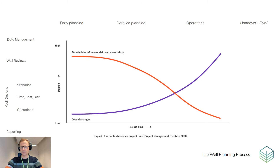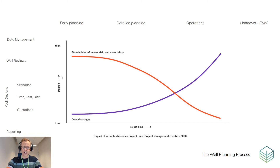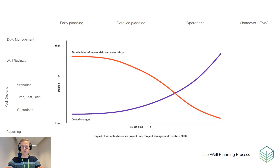Maybe equipment has been ordered, a study has been kicked off, or you have invested many hours on the wrong details. The general y-axis is without specific numbers, but for well planning you can make impact in the $20 million range on the left-hand side of this chart. On the right-hand side, you can take penalties of the same range if you underinvested early.